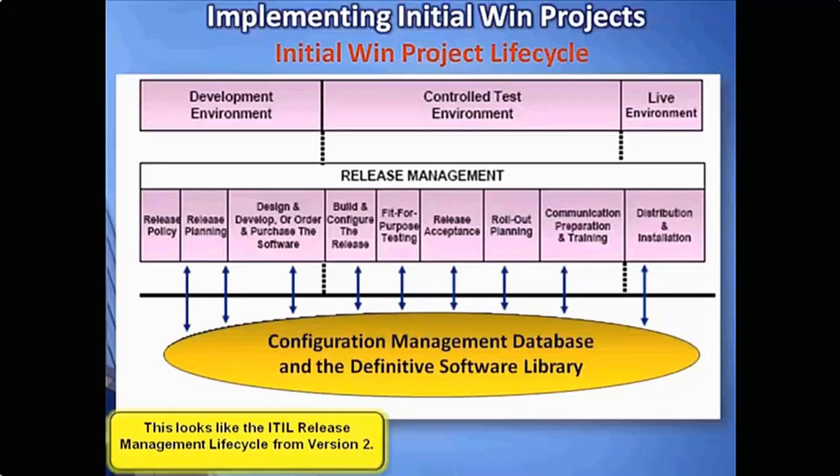Remember that you're going to follow this life cycle for each initial win project. So if you have 3 initial win projects that you plan to implement, each one of those will follow this life cycle. They'll typically go from design to build to test to deployment. Again, a side benefit, this allows you a little bit to test and bootstrap the release management process. It may not be what you set out to do, but at least you're getting a leg up there as you start to build your IT service management solutions.